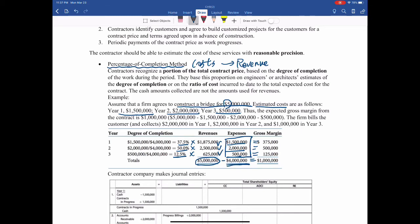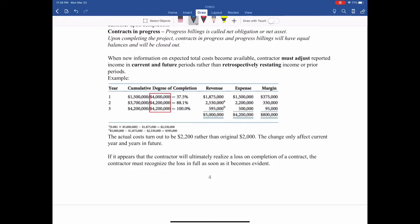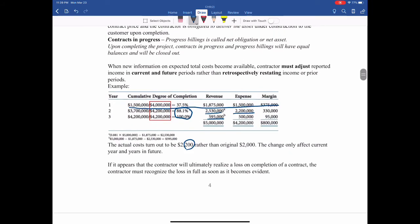The $4 million expense is estimated — just like a budget — and it can be changed. If there's any change, we're going to make the change in that year and the following years. In the modified example, the first year is the same, but the budget expense increases by $200,000. This increased $200,000 will change the degree of completion of the next two years, including the current year. It does not affect the first year's revenue and expenses. The contractor must adjust the reported income in the current and future periods, not retrospectively restate income for prior periods.